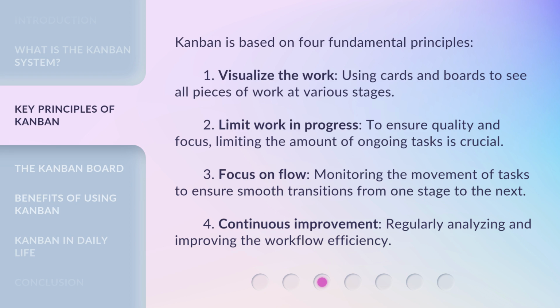3. Focus on flow. Monitoring the movement of tasks to ensure smooth transitions from one stage to the next. 4. Continuous improvement. Regularly analyzing and improving the workflow efficiency.